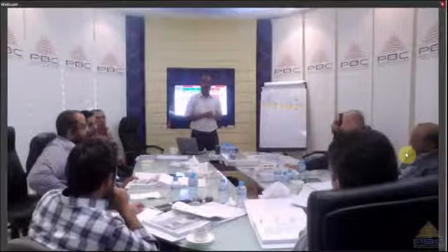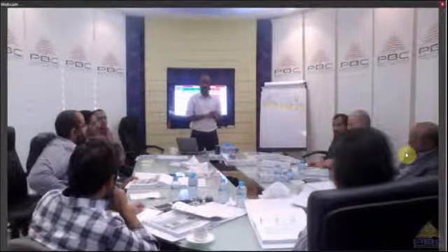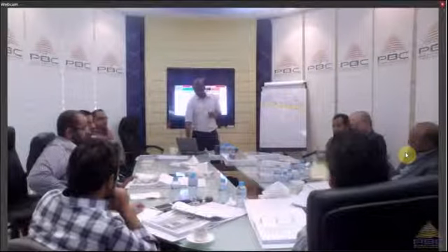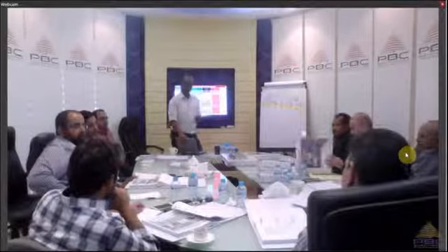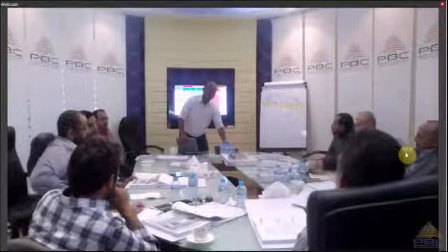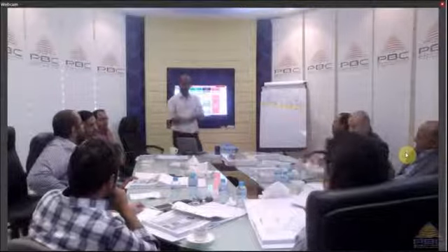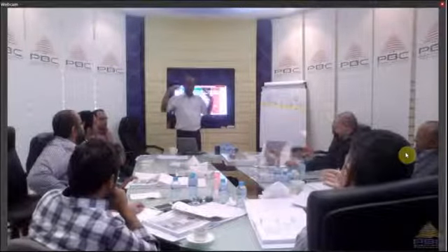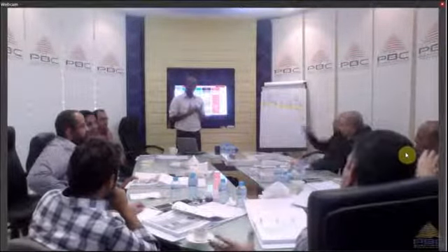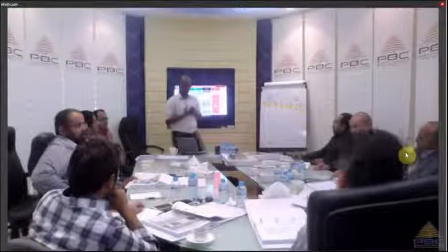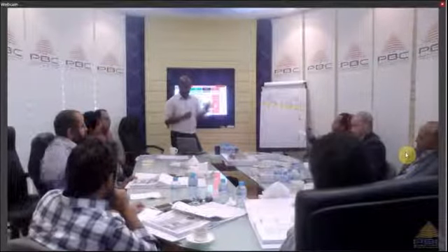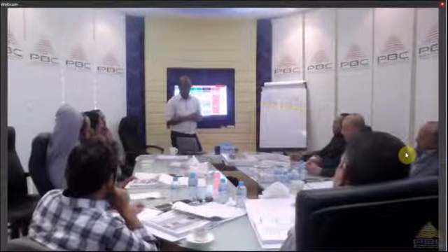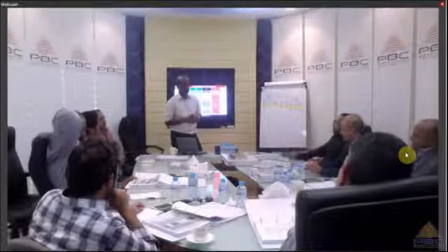For the painter to take 4 hours, that came from past experience or from the database I have. Exactly. I know that Arabs will do this much rate per hour or per day. Other nations are doing this. Exactly. Then they will accommodate it to get the duration. So you do it, but you do it in your head. It's your database, your experience. We already have some database, for example the cubic meters this machine can make in 1 day or 1 hour, this quantity, and I make it for all.